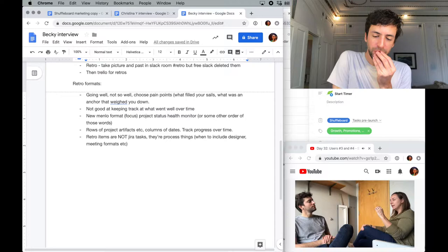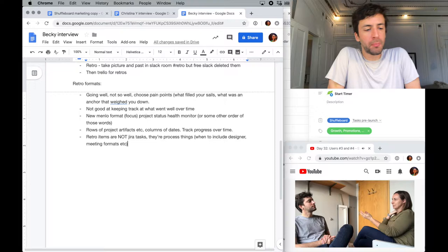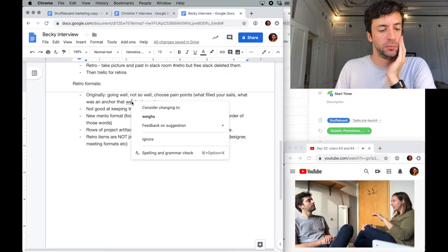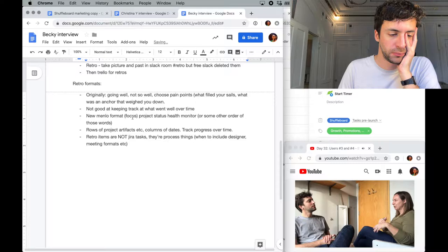And then at the bottom of the spreadsheet, we've started making that be where all of our running experiments go. For instance, I said we're doing sprints right now at 2 weeks instead of 1 week. That's one of the rows that says, do we still like the sprints at 2 weeks, or do we think we should go back to 1 week or change it to some other increment of time? So that's been at least a way for us to keep track of the experiments we're running, sort of. But it's hard to know when that experiment was introduced. We literally just started adding the experiment stuff in our last retro 2 weeks ago.